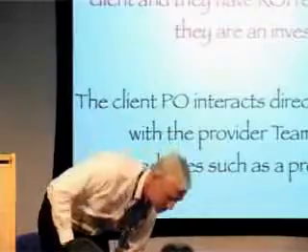So one of the first implications of this when you're outsourcing in, say, India or China is that in the traditional outsourcing model, your outsourcer like Wipro would have some kind of a project manager, and there'd be indirection between the customer, say like in London, and the India team. The customer would think of speaking to some Wipro project manager, and then the project manager talks to the team. We eliminate that completely when you move to Agile offshore, Agile outsourced development. There is no intermediate project manager, and the product owner who's on the business side, the customer side, interacts directly with the Scrum teams with no one in between.